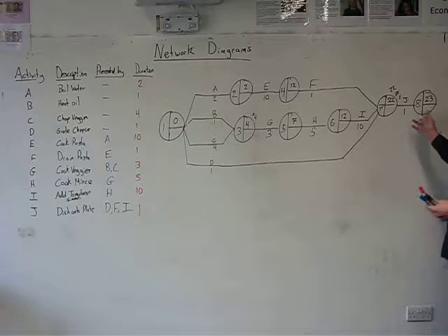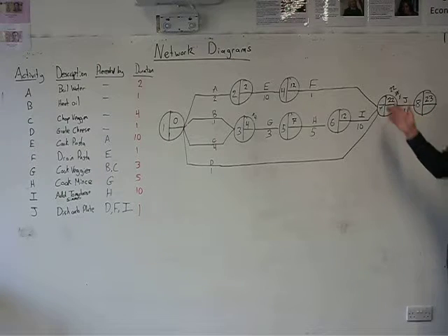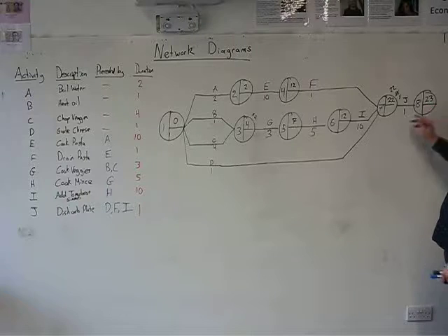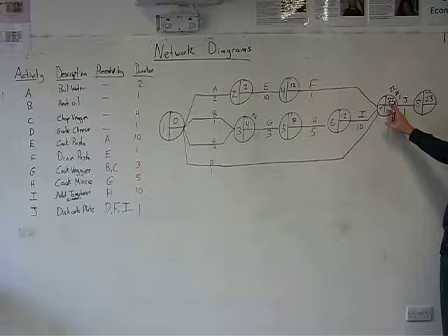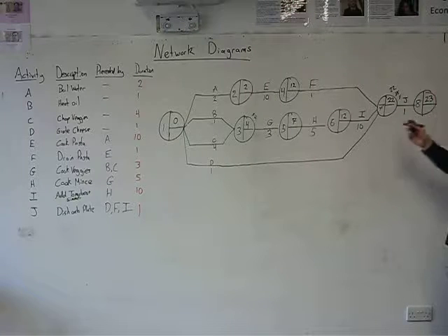Now, by convention, the latest finish time on the end node will be the same as its earliest start time. That's just to say that the latest we could possibly finish the last task without holding up the whole project is the same time as the whole project takes. So I'll just write in the same one here, 23 on the top, 23 on the bottom.